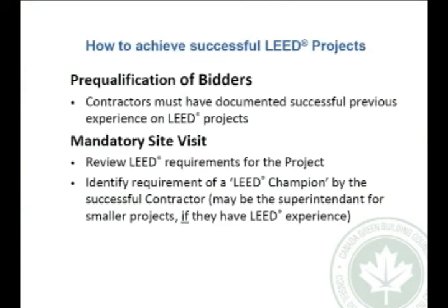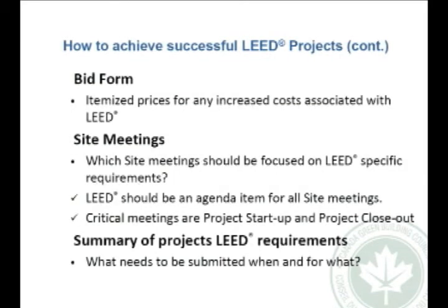Site meetings. Which site meetings do you focus on for LEED projects? It should be an agenda for every single site meeting. The critical ones are going to be the project startup and project closeout. Startup to make them aware at the beginning, project closeout, make sure that everything has come in. Summary of LEED requirements: what needs to be submitted when and for what?